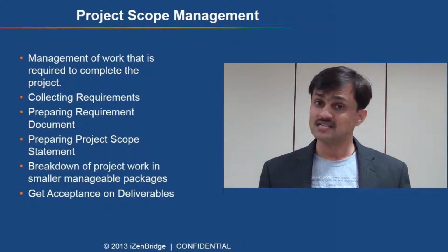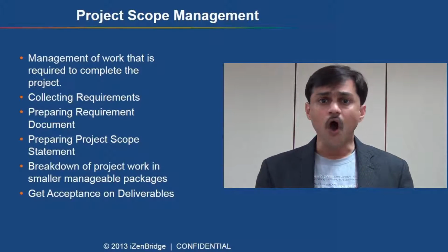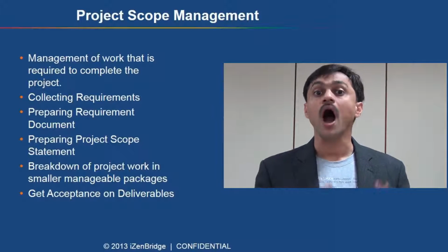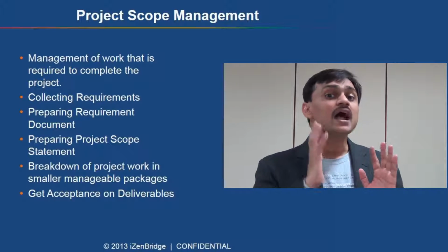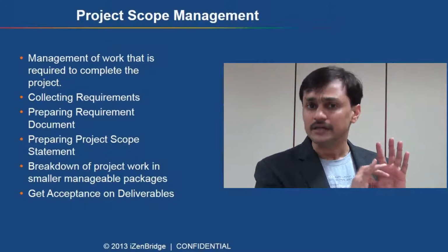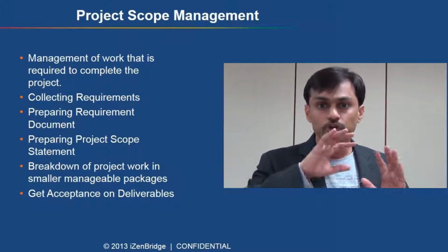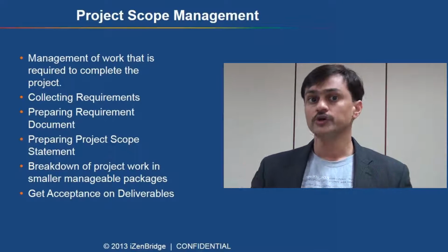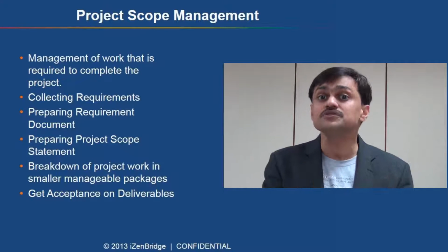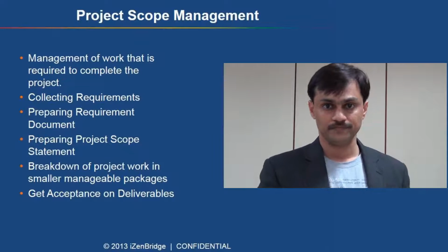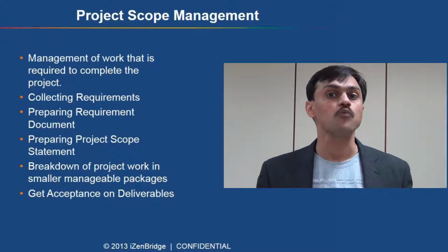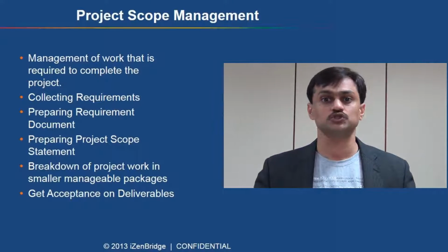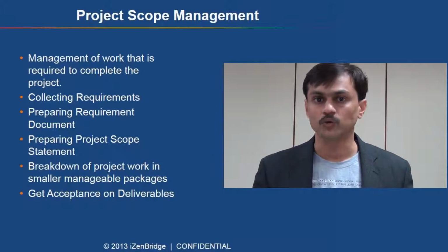Project scope management, a second knowledge area which talks about all processes which are dealing with project scope. You need to identify the requirements first. After identifying customer needs, documenting them into a customer requirement statement, you need to convert or extract scope for the project out of it. So you have a process, you have activities which help you to make a project scope statement. In order to manage your project scope well, it's always advisable to create a hierarchical diagram of your project scope work, which is called a work breakdown structure.